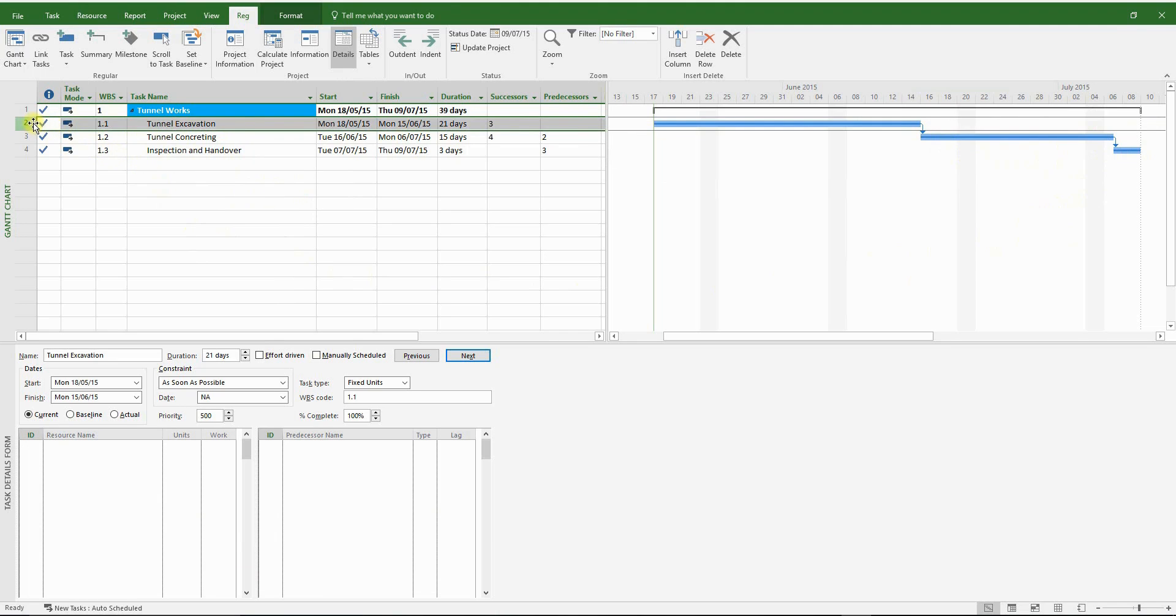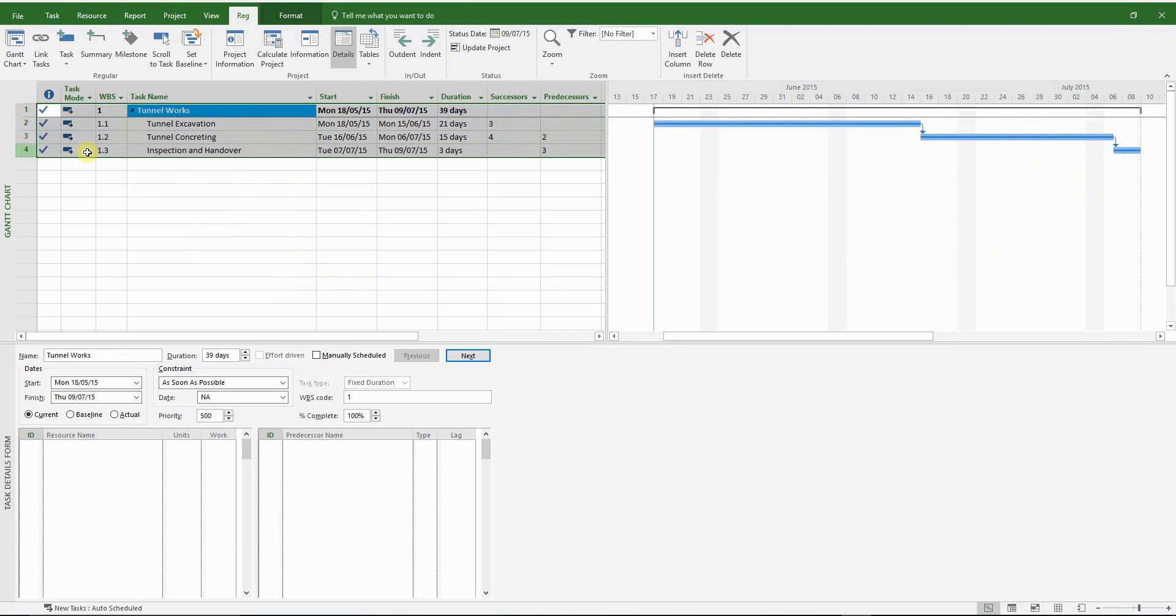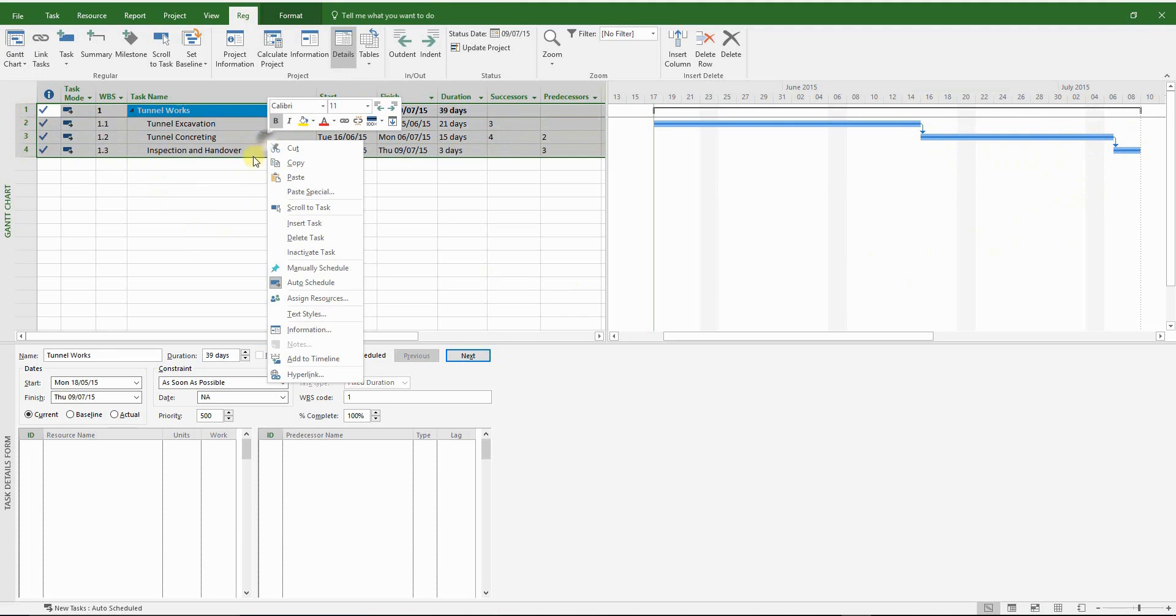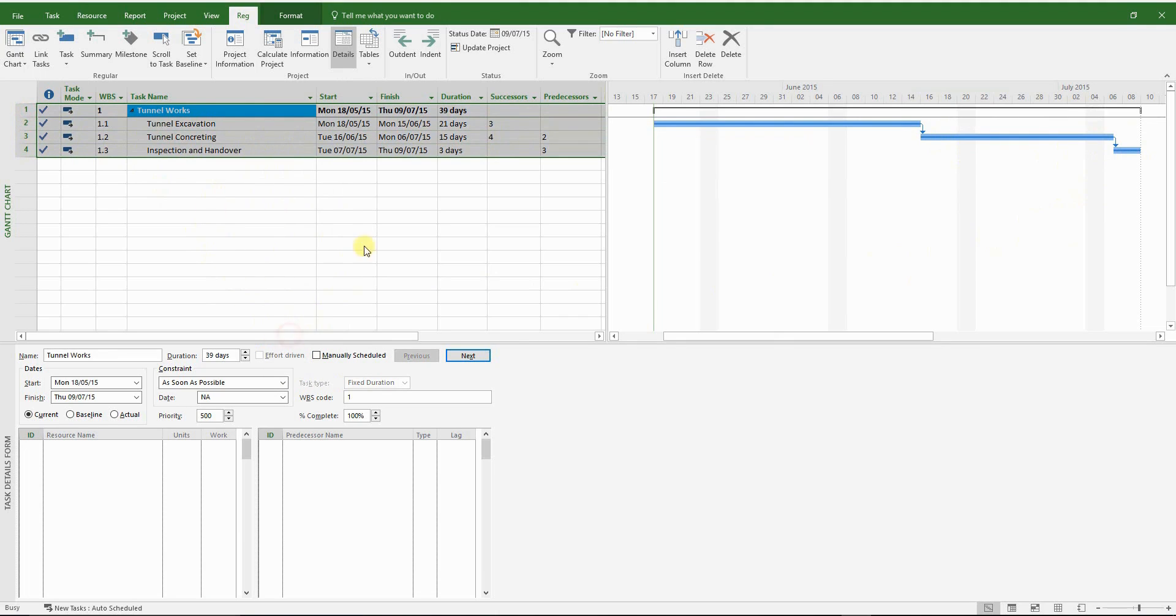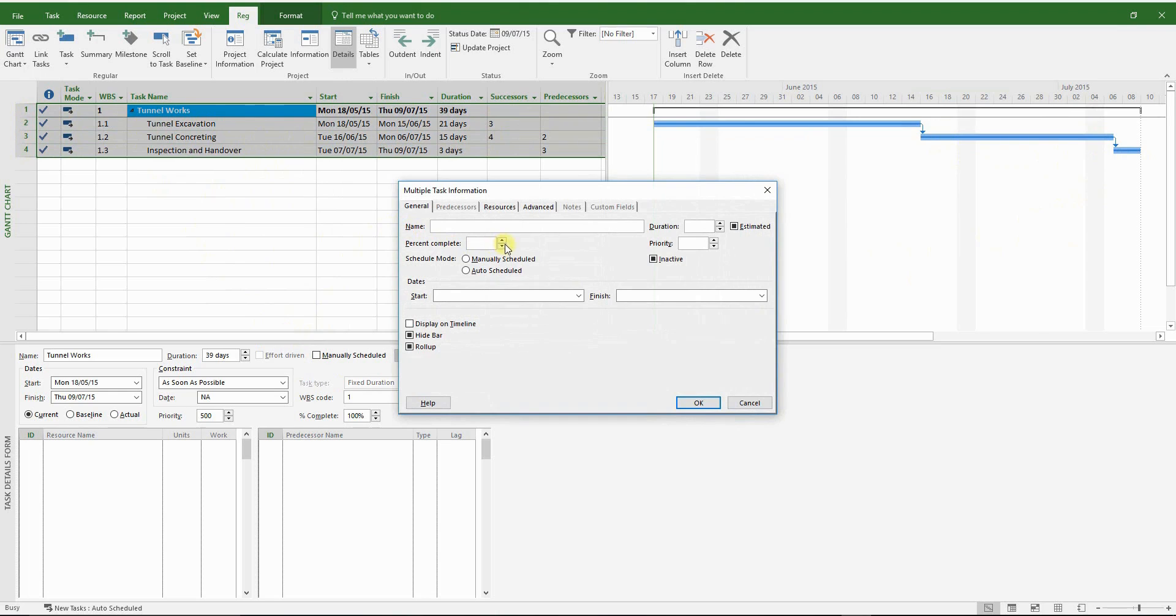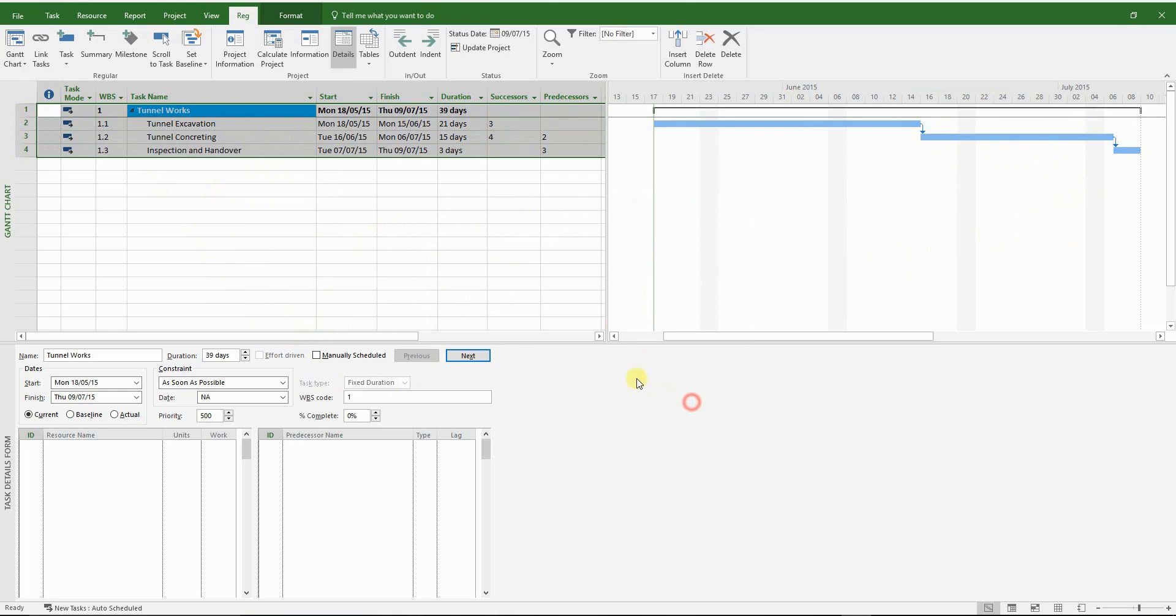So in effect, we are going backwards in time. But in the real world, you will just get an as-built program and you will have to make it dynamic. Insert logical links so that the program can be analyzed.